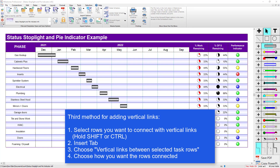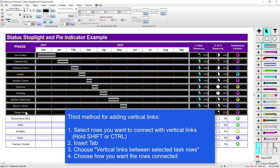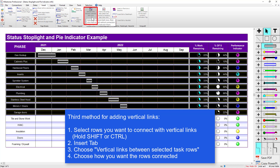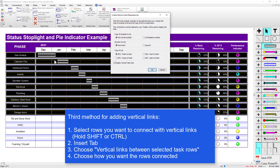I've opened a different schedule to show you the last option for adding vertical links. If you go to the Insert tab, there's an option: 'Vertical Links Between Selected Task Rows'. I'm going to select some task rows — I'll select all of these — then go to the Insert tab and click 'Vertical Links Between Selected Task Rows'. You can see you have a lot of options here. The default is to link finish to start with normal symbols downward, so that's what I'm going to choose. That's going to link the finish symbol with the start symbol. These bars all have invisible symbols on the end, so it looks at the last normal symbol on the row and links it to the first normal symbol on the following row since we're going downward. I'm going to click OK.